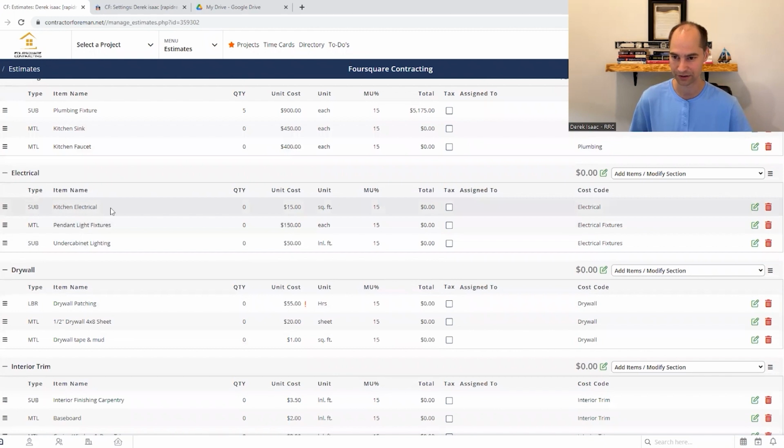So that's that. Kitchen electrical. For electrician costs, you generally want a multiplier like per square foot if you're just doing rough budgeting. So let's say it's a 250 square foot kitchen and dining room that you're doing. That's going to be electrical. This could be one of those standard numbers, which for kitchen electrical, you could have a multiplier of small, medium, large kitchen possibly, and then have different pricing for that. But square footage is generally fairly useful depending again on the type of project it is. So you'll have to kind of figure that out.